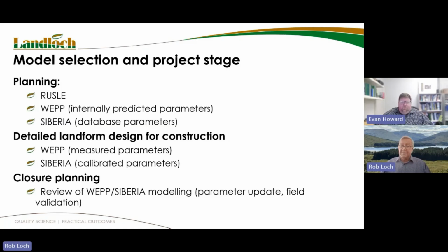And then one exercise that we did a few years ago showed that there was a six-fold difference in the actual cost of moving things around when you went from a poorly detailed design to using the actual detailed shapes. So it can actually be quite a considerable amount of material and a cost that's involved in detailed construction.